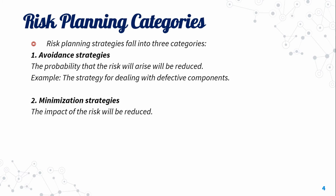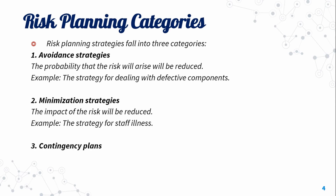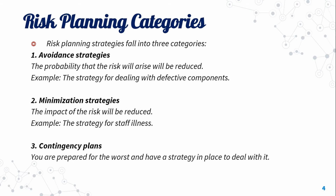The second category aims to reduce the impact of the risk. The third category involves contingency plans — you are prepared for the worst and have a strategy in place to deal with it. An example is the strategy for organizational and financial problems.